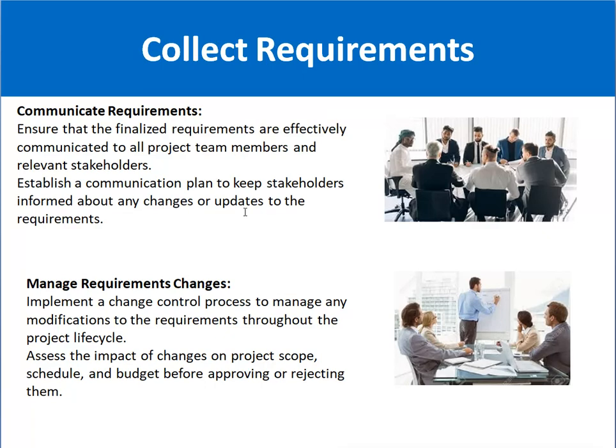Communicate the requirements to the stakeholders. Ensure that the finalized requirements are effectively communicated to all project team members and relevant stakeholders. Establish a communication plan to keep stakeholders informed about any changes or updates to the requirements.